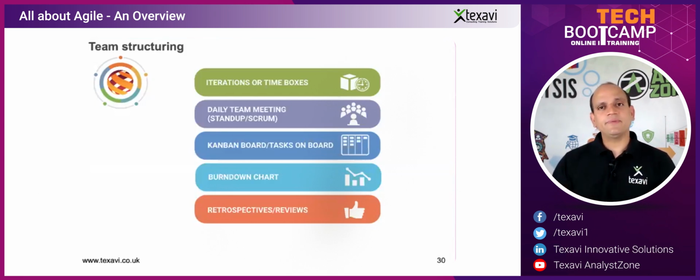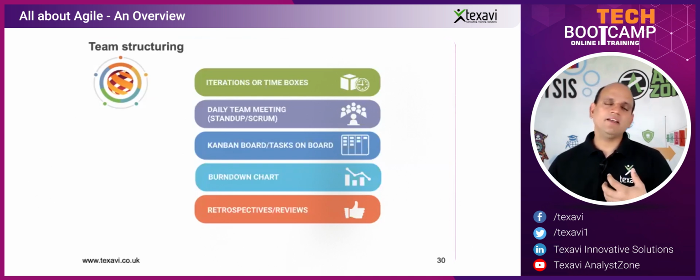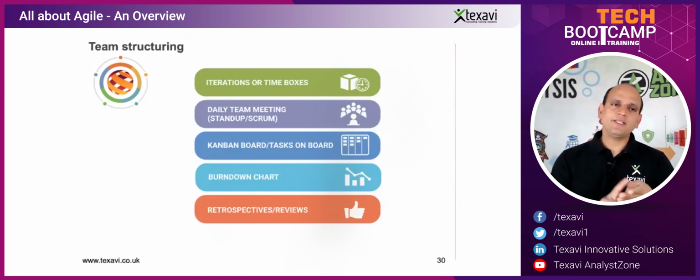And then you also have something called a retrospective, which is looking back and understanding, again, 3 aspects. What went very well in the sprint? So the team discusses what we really did well in the sprint in terms of the processes, the work, the tasks. And then the second point is what did not go well? What is it that we messed up with?